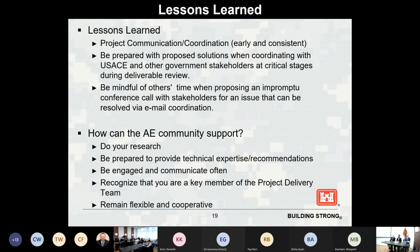Question. In terms of working in a lot of these smaller countries, you see a need, historically not so much, but going forward, where there will be a need to translate documents and information into the local language. In some of the projects, we've included that, mostly for the projects in the Poland area. One of the things we did find is that their highly technical people are maybe not so experienced with the English language. So when we wanted to talk with the engineers or provide them information, we wanted to have that translated. And I think we include that in Ukraine and maybe some of the other smaller countries.